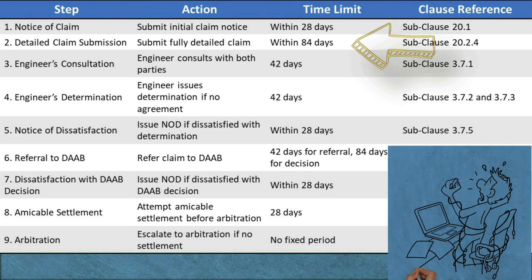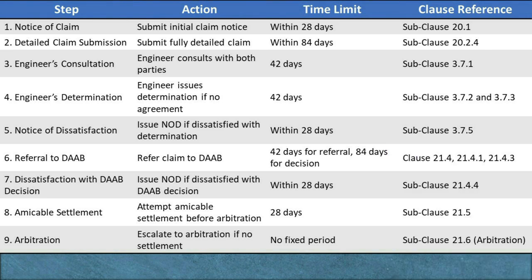Time limit: The fully detailed claim must be submitted within 84 days from the date on which the claiming party became aware, or should have become aware, of the event or circumstance that gave rise to the claim. The 84-day period may be extended by mutual agreement between the claiming party and the engineer, allowing flexibility if needed. Clause Reference: Subclause 20.2.4 — Fully Detailed Claim. If the claiming party fails to submit within this 84-day period, or any extended period mutually agreed upon, the initial notice of claim lapses and becomes invalid.